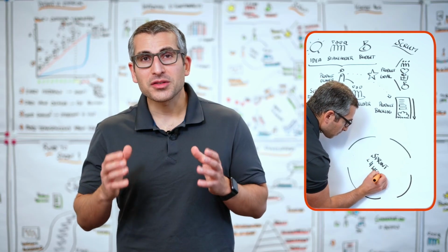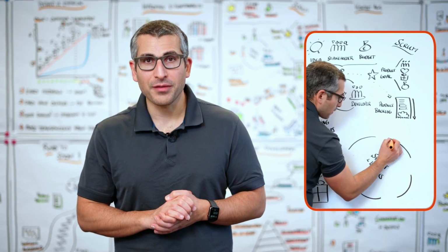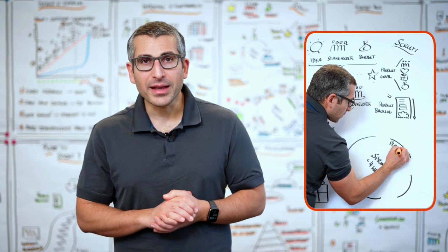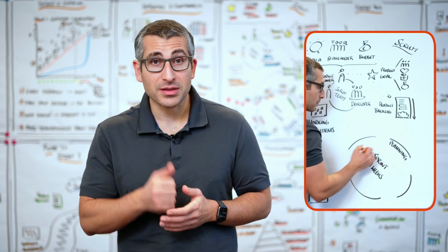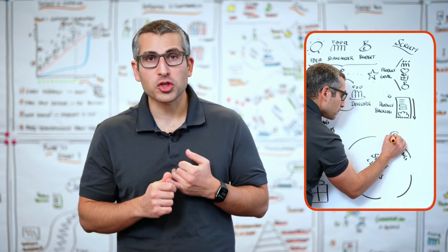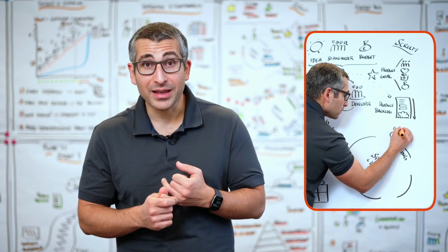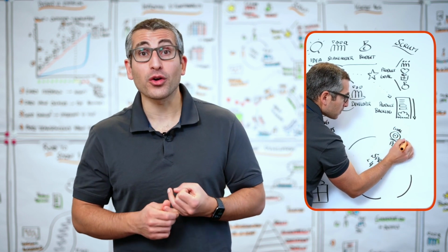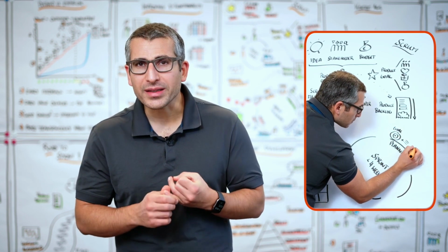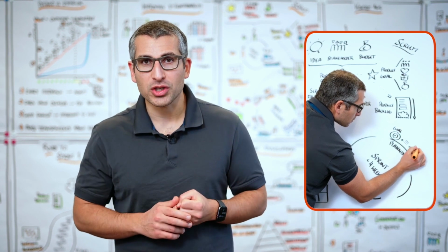Every sprint starts out with a sprint planning event. Sprint planning consists of 3 elements. First, what is our sprint goal? Ideally, the product backlog is prioritized accordingly. What kind of outcome do we want to achieve?